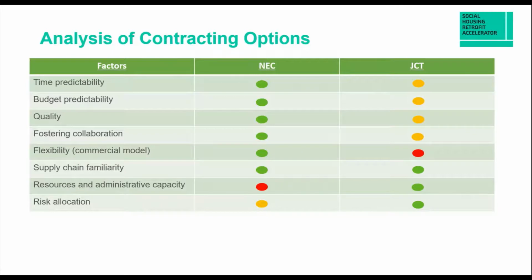I would also say consider giving the different factors weightings. Each factor might not hold equal importance to a client or project, and one might be the overriding factor that has to be taken into account. And indeed, one of those important factors that should potentially be weighted highly, and shouldn't be underestimated, is client familiarity with a particular form. If it's something that you've not used before, consideration needs to be given to upskilling staff potentially, and the time and cost consequences of this.